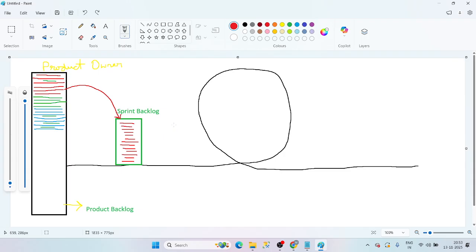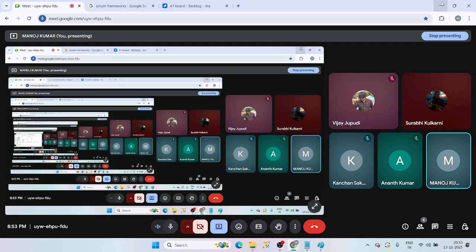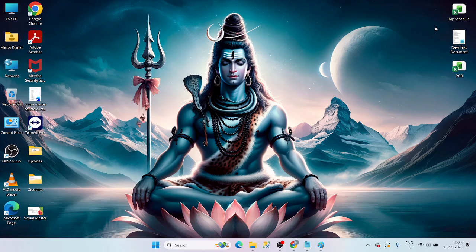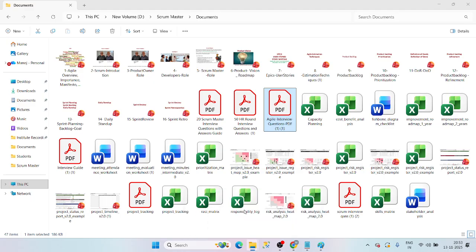We will assign story points to all the tasks. No, that is not the correct answer. If you do story point estimations also, you will do it for 100 tickets. Yes, we will do it for 100 tickets, but based on the capacity of the team for the current sprint, we will be considering the story points. Yes, based upon the capacity planning, we are going to consider it.